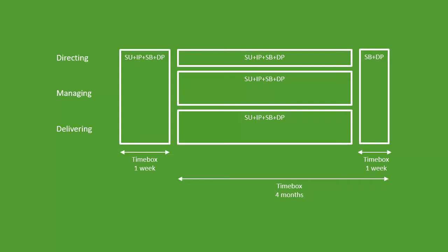They're going to get into one room, and they're going to follow up on what did we actually do in this stage and what are we going to do in the next stage. And they're also going to look at the business case. How is benefit realization going? What are the users saying? We've been releasing twice this stage already, so any data on that. And of course, they're going to look at the updated project plan all together.